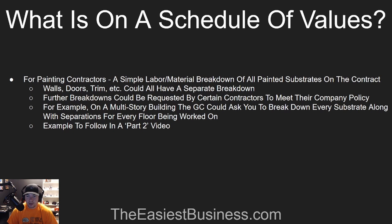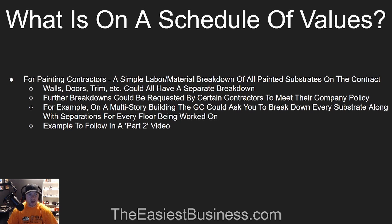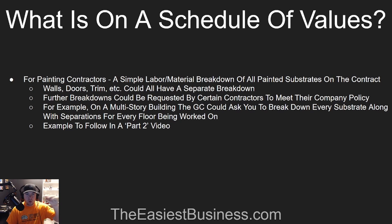So what is on a schedule of values for painting contractors, which is mainly who I deal with? It's usually just a simple breakdown of labor and material, and it deals with all painted substrates on the contract. For example, if you're painting walls, doors, and trim, you're going to have a labor and material breakdown for just walls, a labor and material breakdown for just trim, and a labor and material breakdown for just doors.